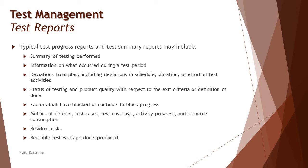The Test Progress Report also includes deviations from the plan — if you had any deviations due to unavailability of requirements, lack of clarity, or sign-off from the business on certain validation rules or acceptance criteria. It also captures the status of testing as of that point — for example during the fourth sprint, what is your status so far, how much those test cases contribute to overall progress, what critical defects have been found, and what blockers are continuing to block progress. If there are blockers and they were not resolved, highlight them in your test progress report.